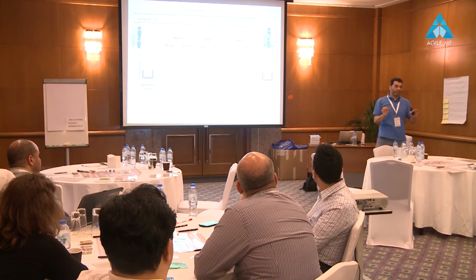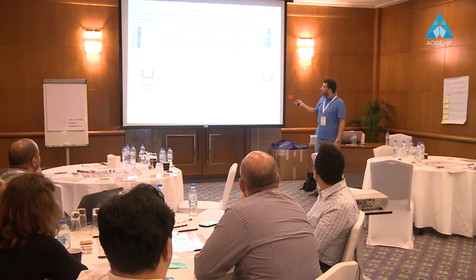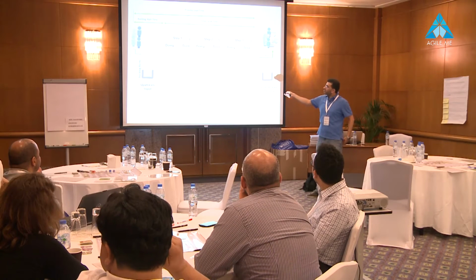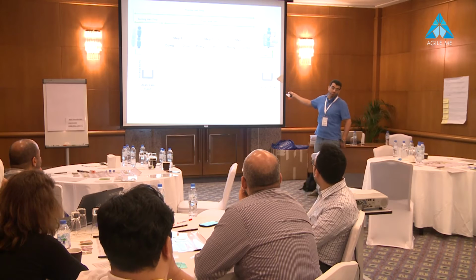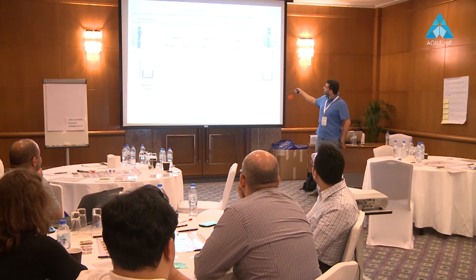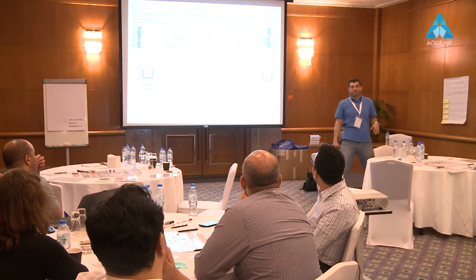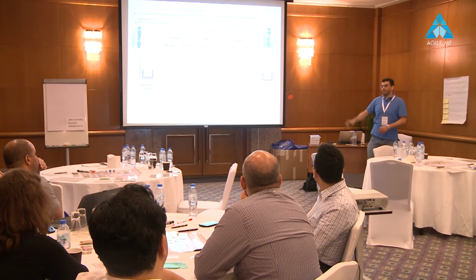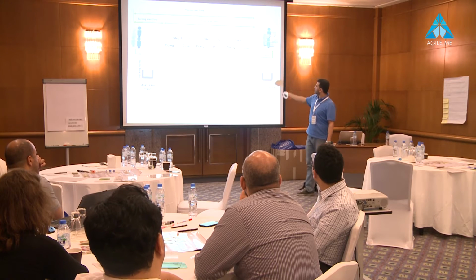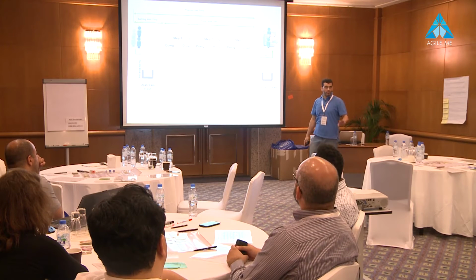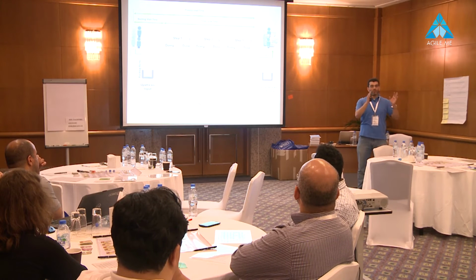What we are trying to do right now is to study our system and put these kinds of limitations or constraints onto the development activity. So what we can do is that, okay, design will put three items only here. Development will put around five items. We have more developers in our team, so we can consume things faster. And testing, we only have one tester, and he can produce things in a slightly slower manner. So work in process equal to two is enough. This means that you cannot have more than two items in this column. Okay, got the idea? That is very simple. Just put constraints on the flow, on the amount of items that you have in the process.